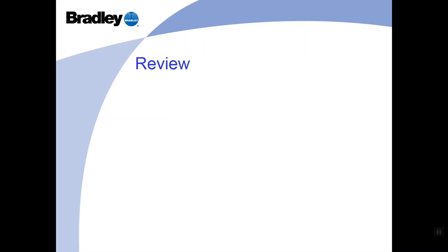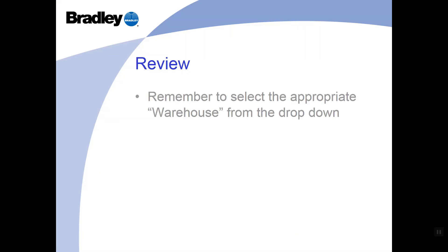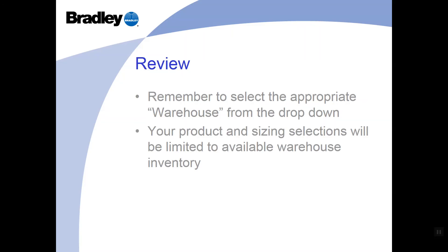So let's review the main points here. So remember, you're going to want to select the appropriate warehouse from the drop down. If you forget to edit your warehouse location, that's okay. It will simply be utilizing all of the inventory and lead times and all those standard lead times available out of Ohio.